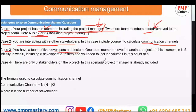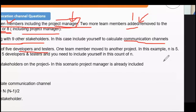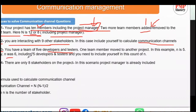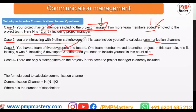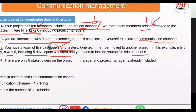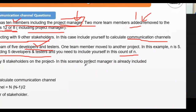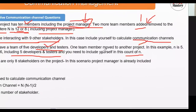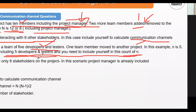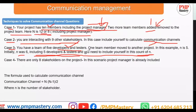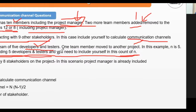Case three: you have a team of five developers and one tester, and one team member moves to another project, so n becomes five. Initially n was six — five developers and one tester — but you also need to include yourself as the project manager, making it six. After one member leaves, n is five. Whenever the question mentions your team of developers and testers, add yourself to that count.